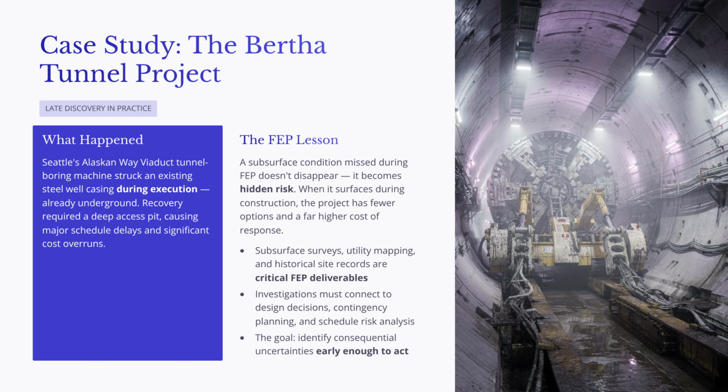This case also shows why subsurface surveys, utility mapping, and historical site records should be treated as critical front-end planning deliverables. These investigations must connect to design decisions, construction means and methods, contingency planning, and schedule risk analysis. The goal is not to know every underground condition with perfect certainty.